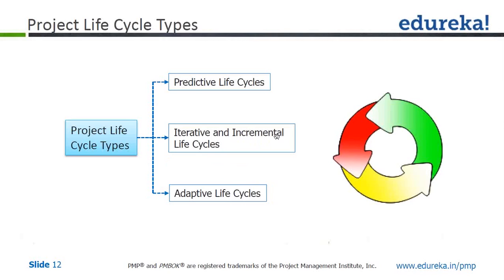The software industry has picked up on these last two very well. In iterative and incremental, what happens is you develop — let's say you have 20 to 25 features to be developed. Maybe in the first iteration you will develop five features, second iteration five features, and so on.